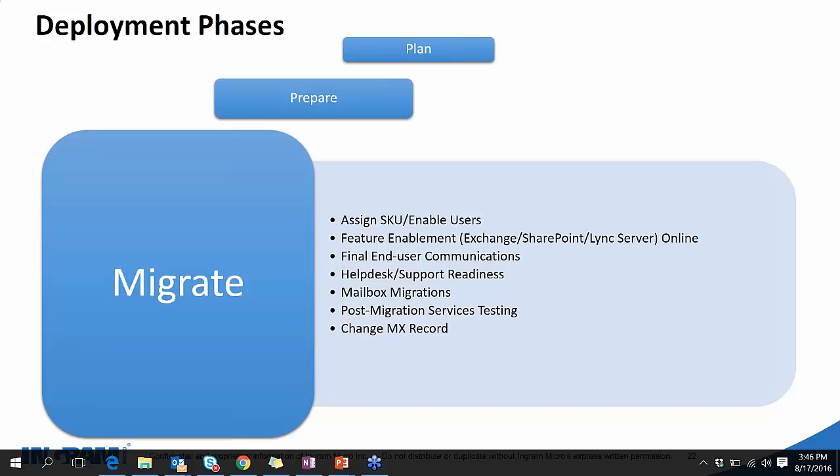So what are the common deployment blockers? For example, infrastructure requirements. When you don't have the complete infrastructure requirements, it would be a huge roadblock. You can convert that roadblock into a milestone by having the complete on-premise hardware, infrastructure, certificate and every infrastructure detail with you. Plus, do the client upgrades before the migration is initiated. That is, if the users are using older versions of Office or Outlook, upgrade them before initiating the migration.